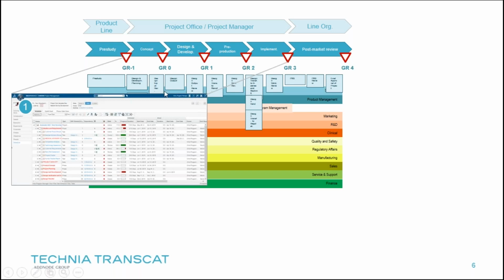But it follows a stage gate process, which means that whenever we store deliverables, it's stored against a set of folders, which in this case will represent our design controls categories. So it's clearly defined deliverables for design input, design output, design verification and validation, etc.